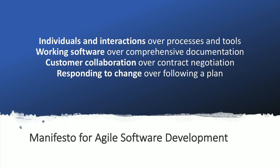So those conversations give you a chance to talk about test-driven development, right? Here's what it's going to give you for the long haul as a government agent. And to the developer, hey look, we're giving you a definition of done before you get started. So now you understand what you're building for. If it passes this test, you're done. If it doesn't, you're not. This is just our agreed upon way of saying when this is done. But you need to get that buy-in. If there's no buy-in, people are going to feel like you're wasting their time, and then they don't want to be around.